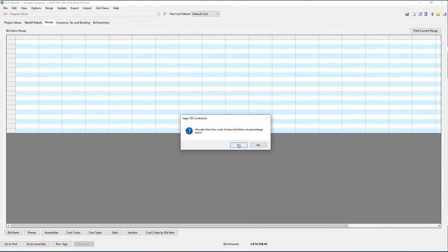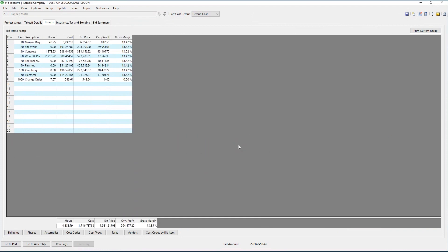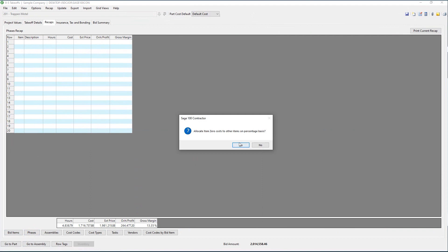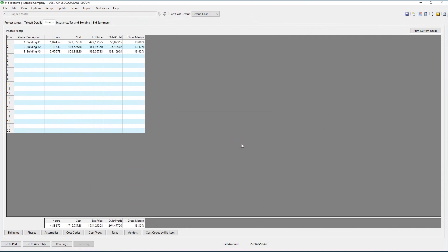Using the recap option gives you several different views of your data. The first is by bid item — note the calculation of the labor hours, the cost, the price, the overhead, and gross margin. If you charge costs to bid item zero, those can either be allocated across your bid items or shown separately in your estimate and recaps.